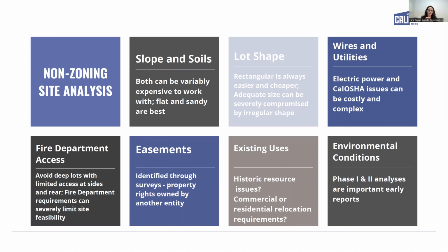If you were talking to your architect, they would probably be right away thinking about when I drop this building footprint down onto this site, how challenging is it going to be to work with the fire department? Can we put together a building that has relatively easy access for the fire department based on the requirements of that fire department in that jurisdiction? There's a note here about avoiding really deep lots that make it hard, based on a certain department's rules, to access the back of your building if it's tough to get there with a fire truck.